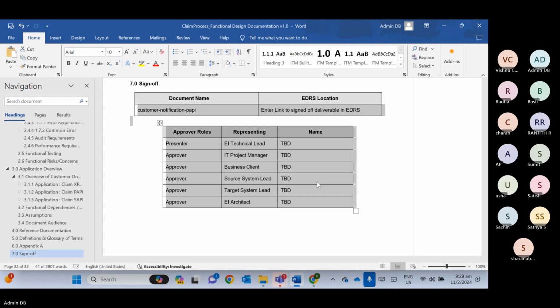Like that. Okay. Is there any parameter to decide whether it's simple, medium, or complex? No, there is no parameter. Simple means you are doing a very small change, only updating 1 or 2 values and then done. Medium means you are doing enhancement in many business logic in many places. Complex means you are completely going to change the orchestration. You will add an additional call to get the data and all.